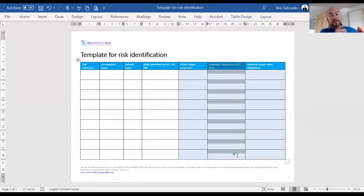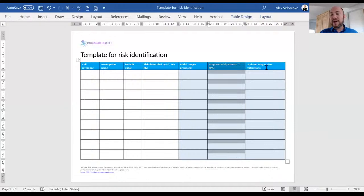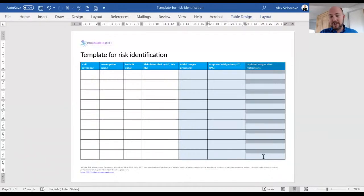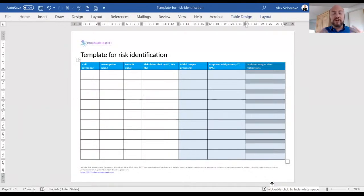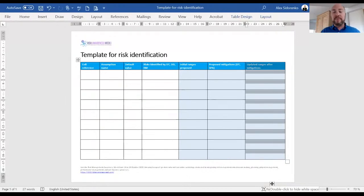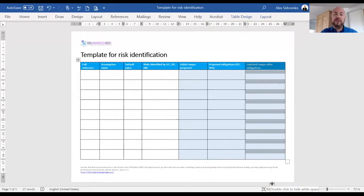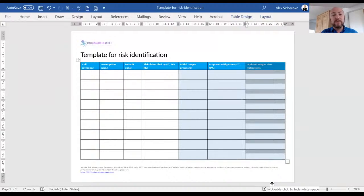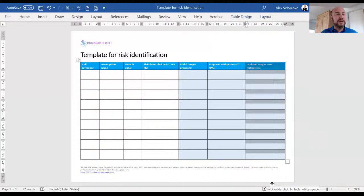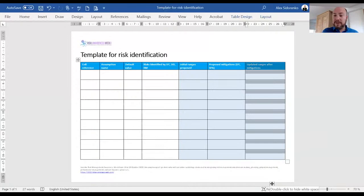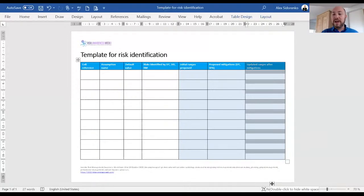Once we have mapped out all our mitigations against the risks, against the assumptions, against the decision, we now come up with an updated range, which may be smaller, it may not be smaller, because we have not proven that we have enough information to reduce the range. We may come to a conclusion that we have no information on a particular risk, and we may have to exclude it, but have to be very transparent about what we're excluding from our risk analysis. Basically, what we're aiming to do is reduce uncertainty on each of the assumptions based on the mitigations.